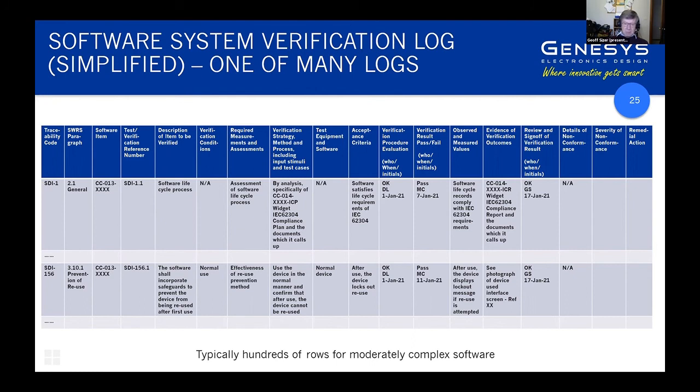We then review that and sign off that that verification is acceptable. We then have an engineer go through and run the test and capture the results, once again with evidentiary outcomes by way of photographs or references to documents. We then sign off that this verification process and these results actually demonstrate verification against these tests.